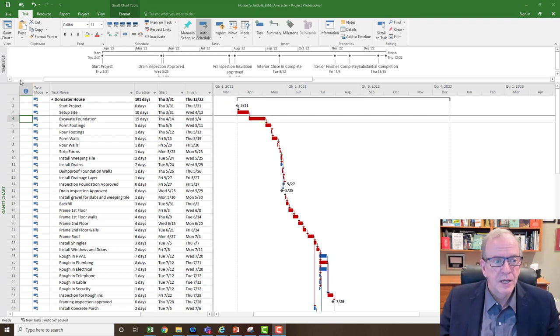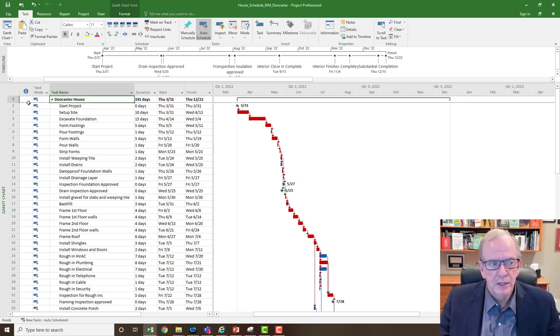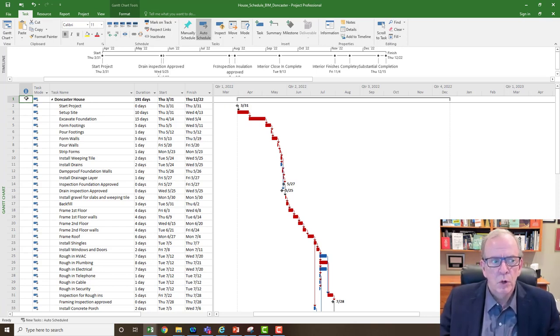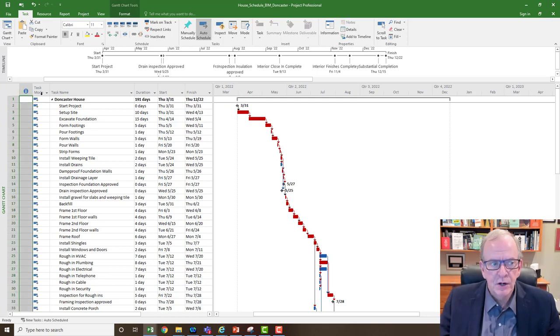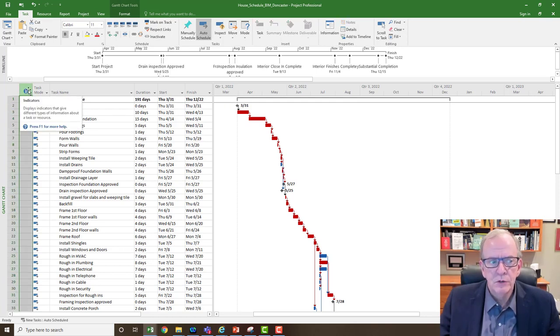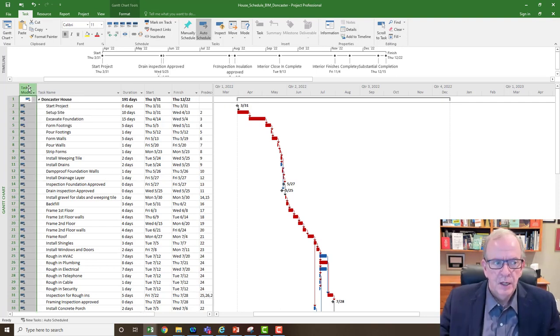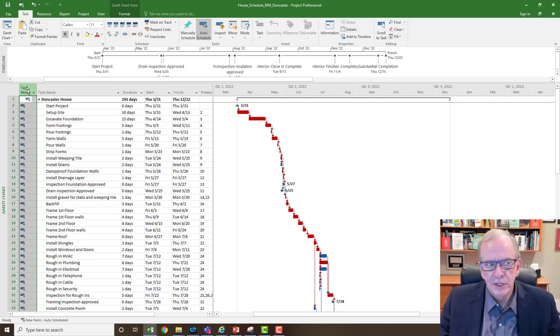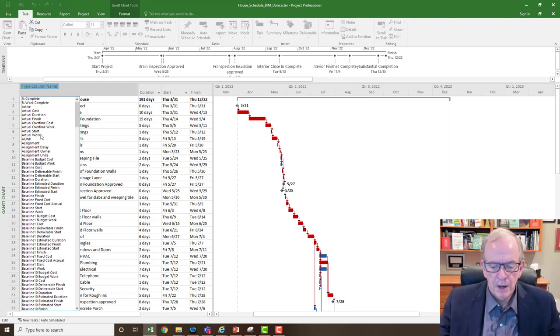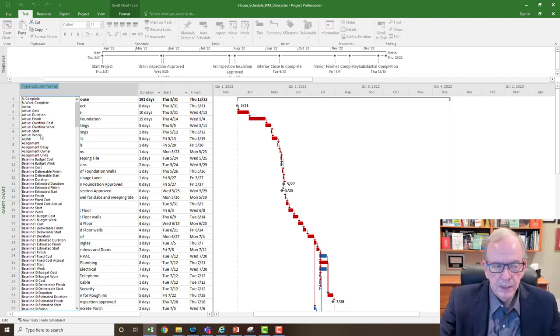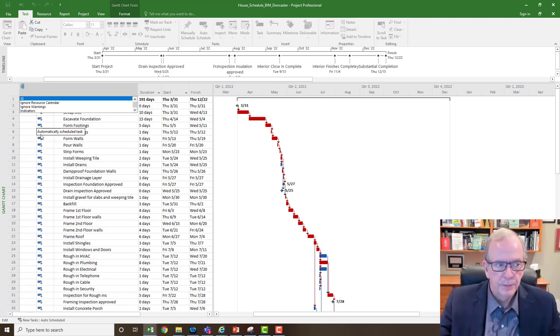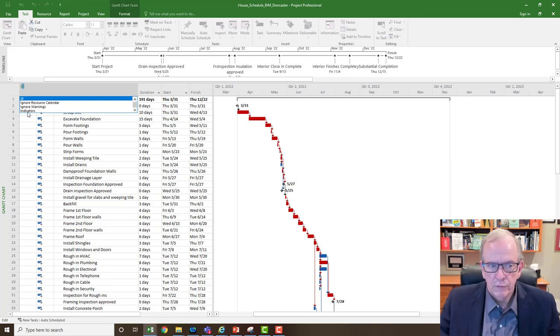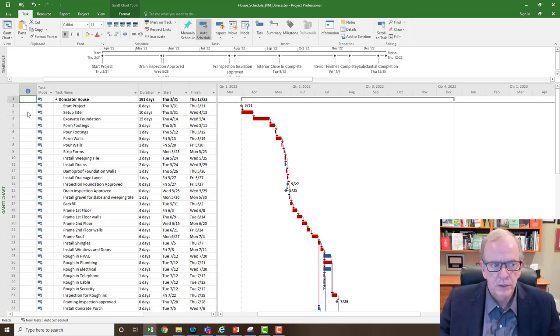For example, let's say this house project. If we were all the time using a specific set of drawings with this house, why don't we link to that? What we can do is use the indicator column, and I've said this before, very useful column. If you don't see it on your screen, all you have to do is right click, go insert column, type I for indicator. And that way you can bring it up on any screen. So as long as you know the first letter of the column that you want to insert, then it will appear.